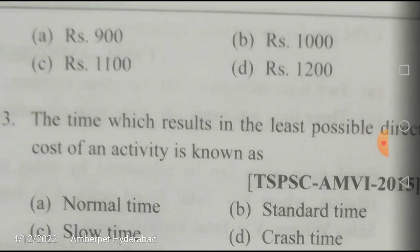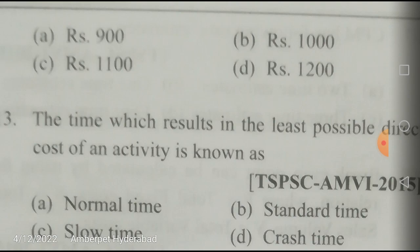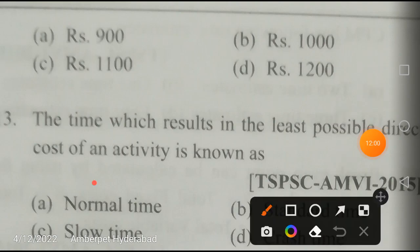The time which results in the least possible direct cost of an activity is known as normal time — not standard time, slow time, or crash time.